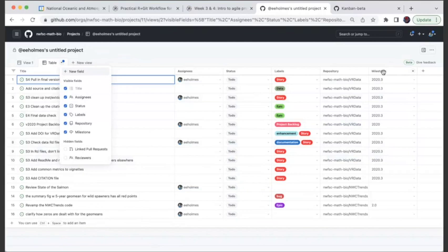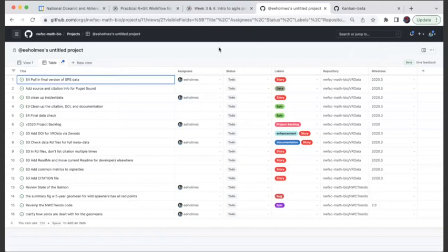So I organize my tasks, my issues, into milestones. These are collected things, like my next milestone has to do with documentation. So there's a series of tasks on milestone 20.3 that have to do with finishing up documentation. So I organize it that way, and then I'll have another milestone having to do with a different theme of work. And that's how I do my iterations. So I'm going to get done with milestone 3 before I start tackling the tasks in milestone 4.